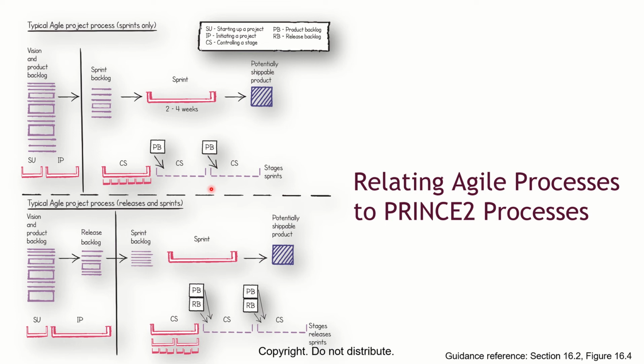A sprint itself, without looking at release, can deliver the ground floor for you, which means when you get to the building site, you saw that okay, the ground floor is done, you started to lay the block on the first floor. That means the ground floor is completed. Do you understand? It is completed, but it is not yet what you can use, because you did not ask them to release it for you to use. So there are people that build, and as they complete each floor, they make use of it. Some people will not make use of it until they complete everything.